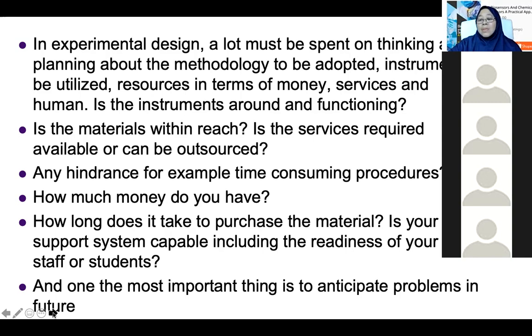But when you design your proposal and you forgot to check whether the material is already available, or you forgot to check if you order, how long will it take to arrive to Malaysia, then you'll be in big trouble. So checking or studying or asking information on the material, whether you can receive it as early as possible, how long will it take to arrive in Malaysia is very important. So that will be on instruments, on material.